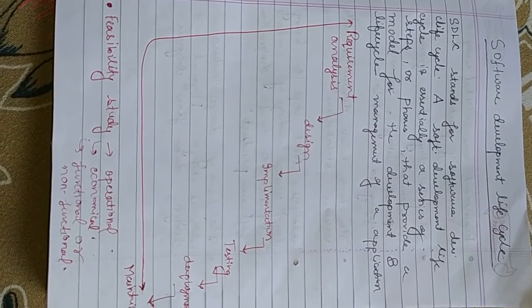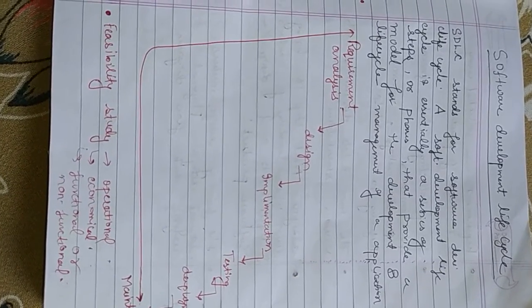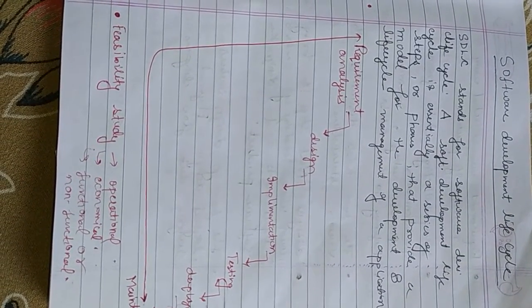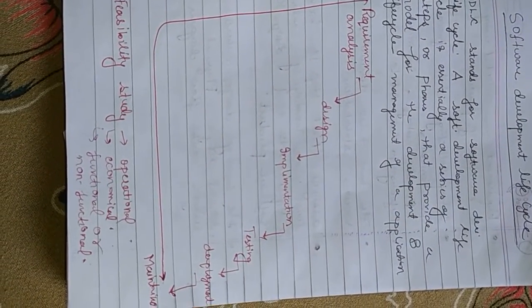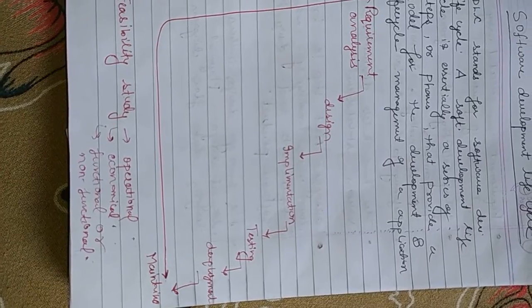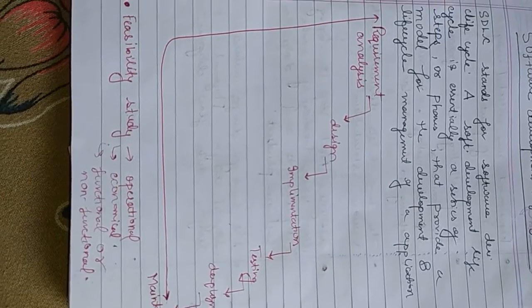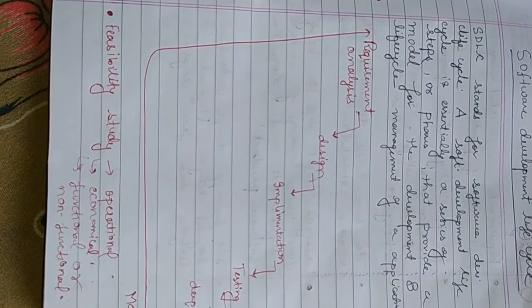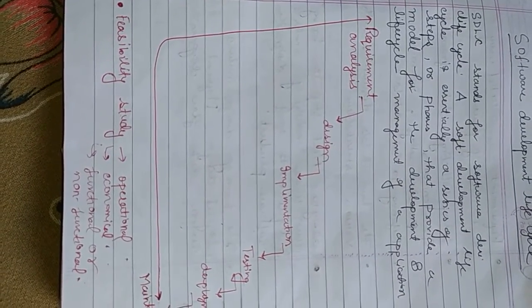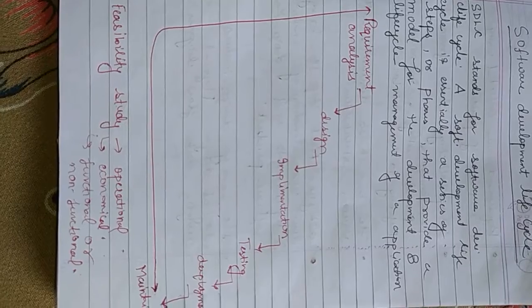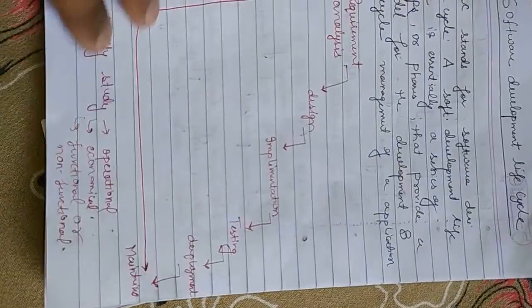The various steps of the software development lifecycle model are: the very first comes requirement analysis. Then we jump towards the designing phase. Then comes implementation. Then testing, deployment and maintenance. Feasibility study is one of the prominent parts of the software development lifecycle model, but I have not mentioned it here because in software project management, feasibility study is done with the requirement elicitation as well.